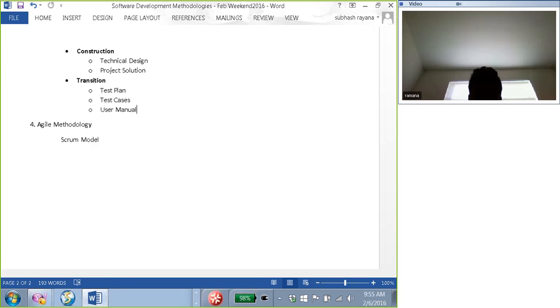And depending on how critical the requirement is, business always wants flexibility from technology, right? That's why a lot of projects end up delayed. There could be several reasons why a project is delayed. It could be technical resource availability, or some technical challenges, or a lot of change requests coming in. So there could be several things that impact it.